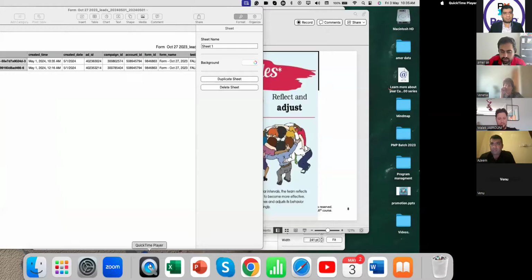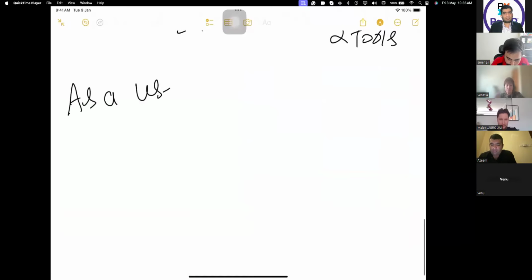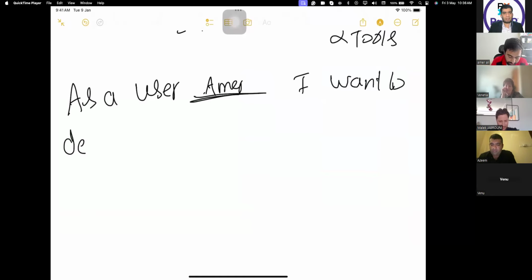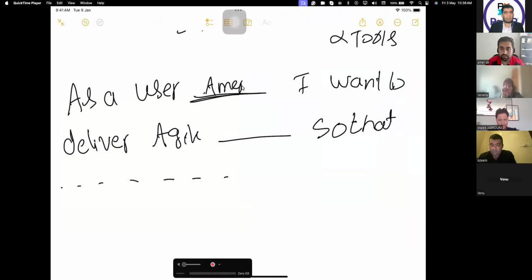The context we use is: as a user, whoever it is, let's say it's Amer, I want to deliver an agile class to my PgMP students so that they can answer any agile question. That's one user story. That's one user story, right?